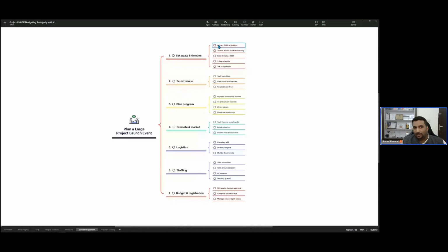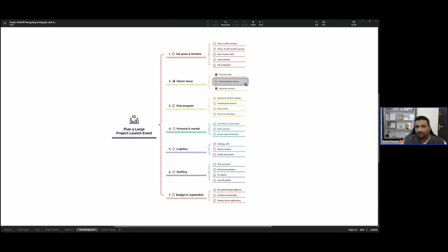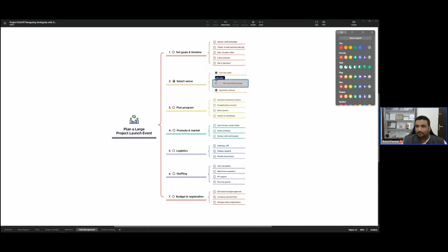If you see, I've added tasks for all the end nodes of this mind map, and the moment I click on any of these elements, the status of the parent is automatically getting updated or changed. Now, if I want to mark all of these tasks as done, I can also click directly here and it updates that. Or if I want to uncheck all, I just have to uncheck it from here. So Xmind offers this beautiful possibility of tracking tasks and showing live status. So the next time you go into a review meeting or a status meeting, you can directly show how much percentage of what task is done, what is pending, and maybe you can highlight if something is red, or you could mark a flag that this is red and what is the reason for it, and you could add a reason or remark